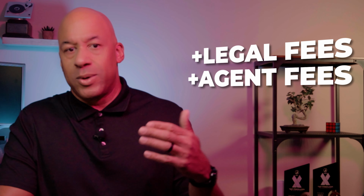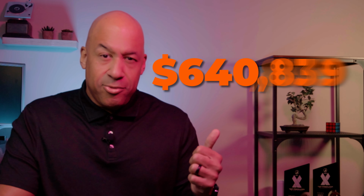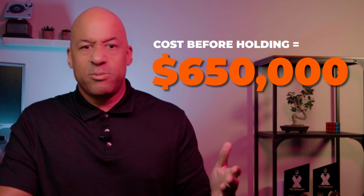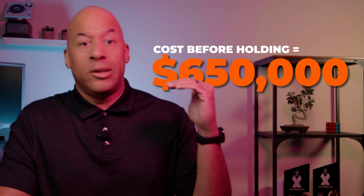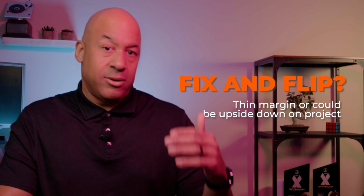Now, if you're going to sell it through the MLS, and let's say we were able to get $700,000 for it, legal fees after buying it, and then legal fees and agent commissions when selling it would add up to about $28,250. So given the estimated price range, after all the fees, that could leave you with a net between $649,000 to $673,000. We were at $650,000 before any holding costs or any contingency funds were even added. If for some reason you went over budget, or the home ended up selling at a lower end of the range, you could easily be upside down on the project. Again, maybe a bit too risky on this one.